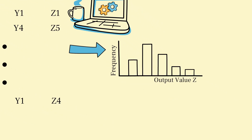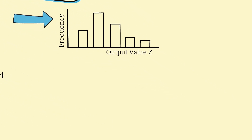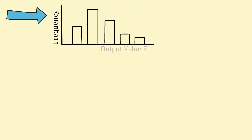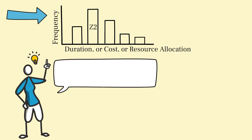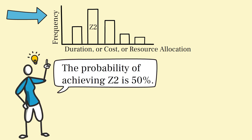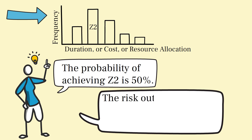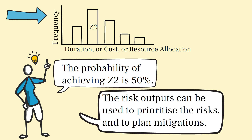As the simulations progress, we calculate key project metrics, such as completion time, total cost, or resource allocation, for each generated outcome. This helps us assess the likelihood of meeting project targets and identify high-risk areas that require mitigation strategies.